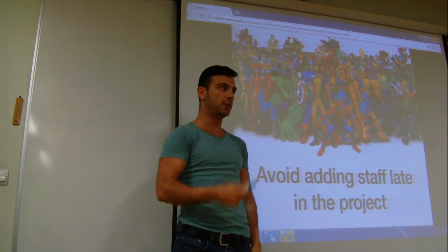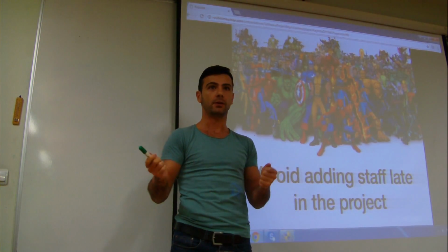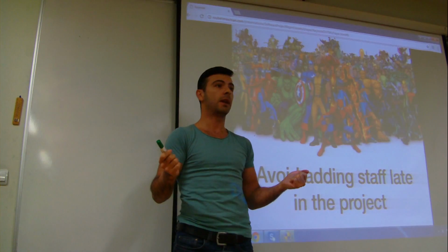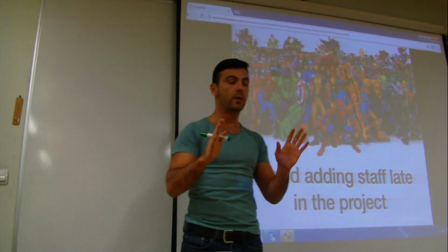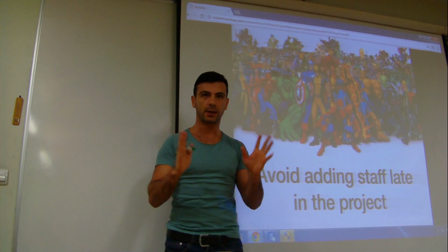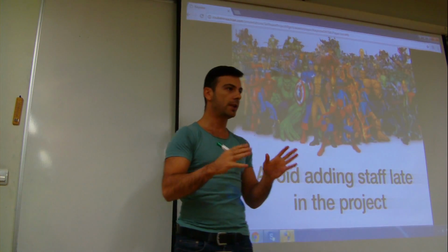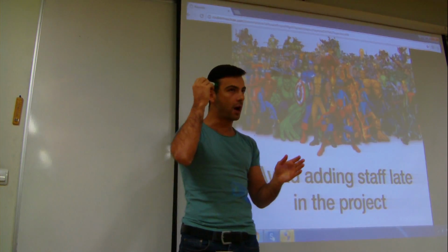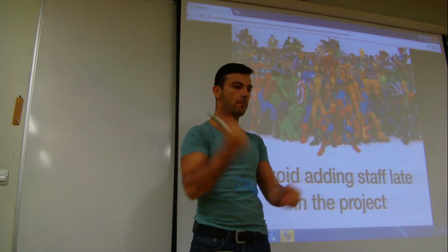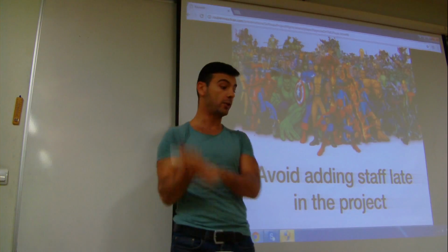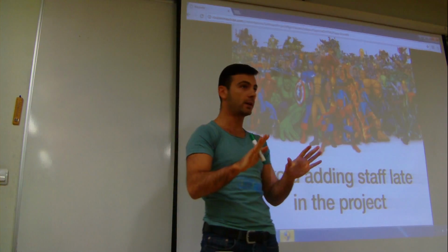Because more engineers means more coding, and more coding means faster. Yes? God, no. No. Okay, remember, software engineering is discovery. Software engineering is applying knowledge to a product. It's not like manual labor where if you add another one, now you have two people hammering. It doesn't work that way.